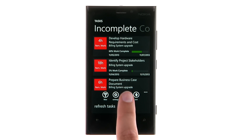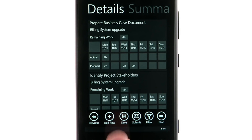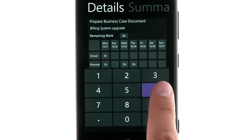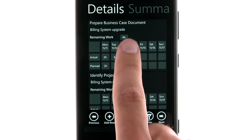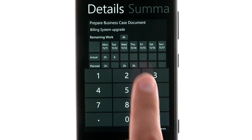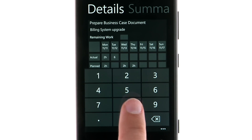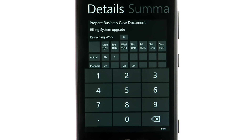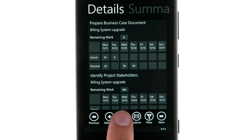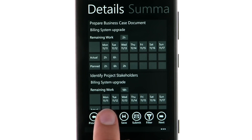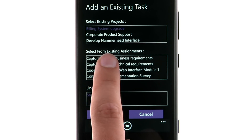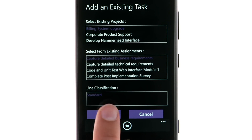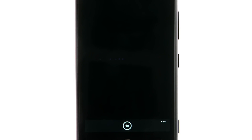Select the timesheet to view planned work for this reporting period, track actual work, and update remaining work. If your task is not on the timesheet, select Add Row and choose from Existing Assignments to find an assignment that is not yet scheduled to be worked.